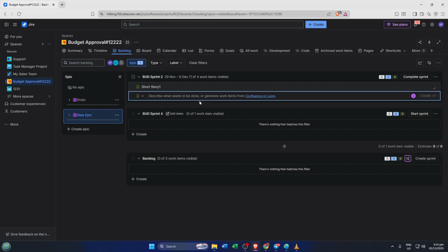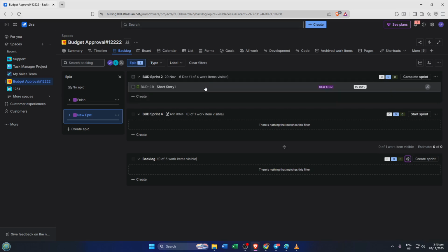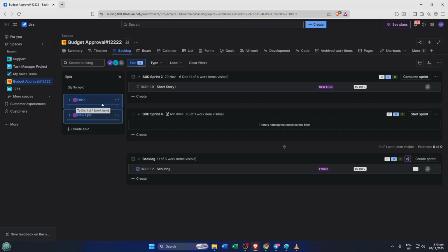After saving the issue, it's time to link the story to the relevant epic. You can do this by dragging your new story from the backlog and dropping it directly onto the correct epic in the left panel, a simple drag and drop. Alternatively, open up the story details, locate the epic link field, and select your epic from the dropdown. This step isn't just housekeeping, it maps out how each user's need ties into larger goals.